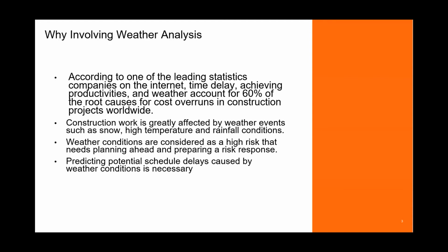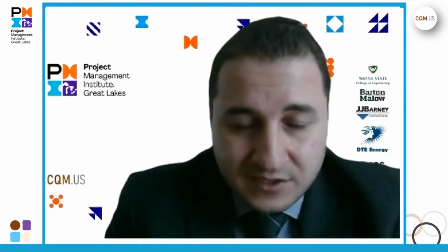So you're just accepting the risk by adding an allowance or contingency duration at the end of the project as a risk response. You're not accounting for it during the execution. If anything happens in the middle, some of the milestones will be affected, and you will not meet some of the deadlines or major milestones during the execution. This is something you really need to check and address, because we are not just trying to reach the final deadline. We're trying to reach every milestone correctly, with a specific and transparent duration.